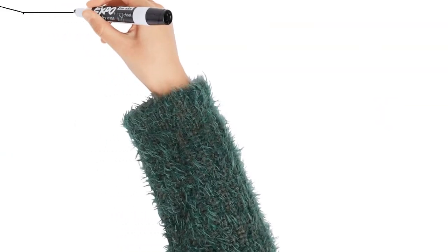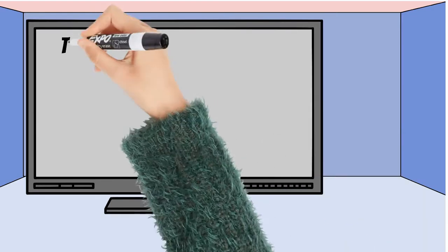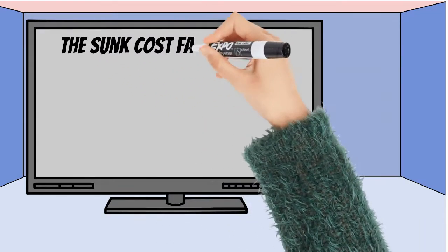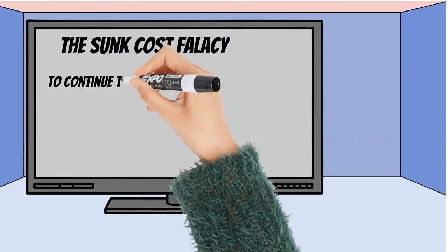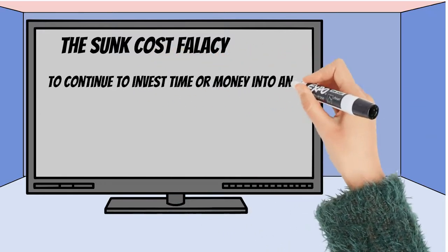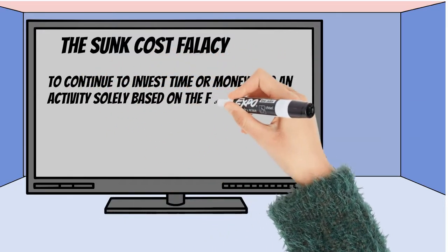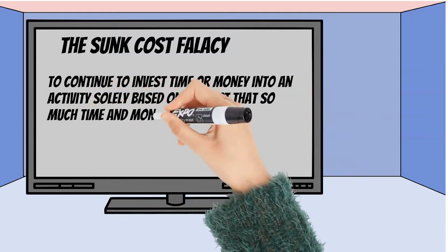This brings us to the sunk cost fallacy. When estimating the business value of items in the product backlog, there can be a temptation to just finish an incomplete item from the previous iteration. And doing so without reviewing: has that incomplete item been delivered to MVP, in which case can the MVP be implemented as is? Or what is the cost to implement this item compared to the additional business benefits still to be delivered on that item?